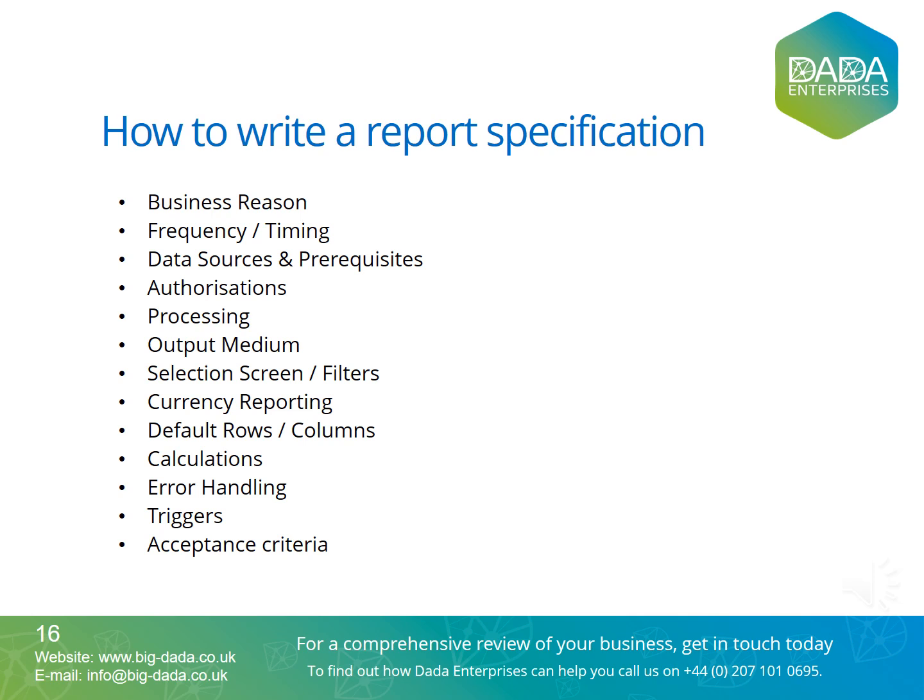In some cases, companies may have global operations and will need to decide whether reports should be in the transactional currency they occurred in, or will there be a global reporting currency? If there will be a reporting currency, then what will it be, and will they use floating exchange rates or pegged exchange rates? Further, will there be currency hedging?